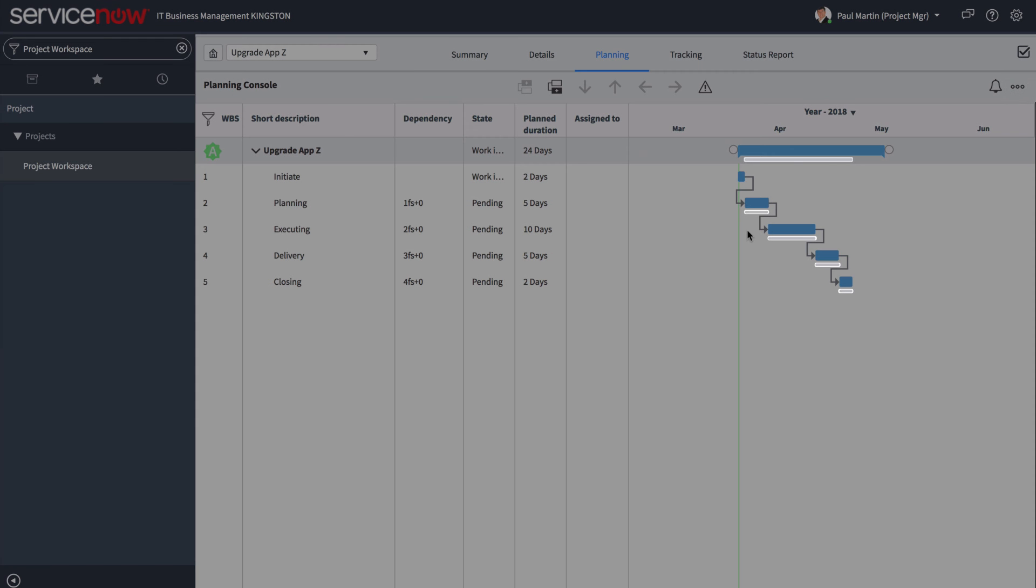The baseline appears in the Gantt chart, and you can see a variance between a baseline and the current schedule.